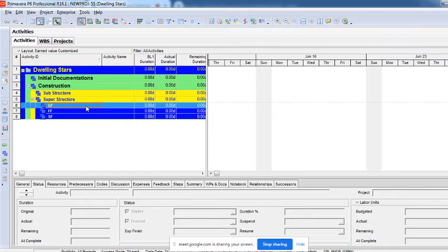So how do we know till where we have to break this down? Usually we break down until we get a single scope of work. When I say superstructure, there's a lot of scope again. So I mentioned ground floor, first floor. Now when I say first floor, is superstructure first floor sufficient? No, there are multiple scopes again under that. So what are the multiple scopes we have? Still again you have to break that down, right?